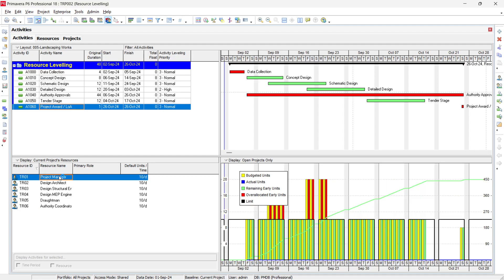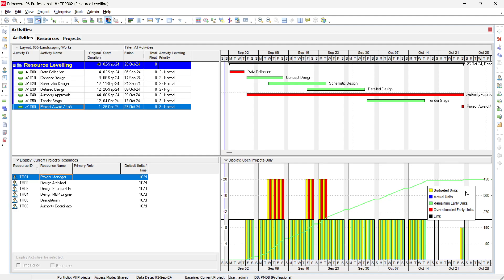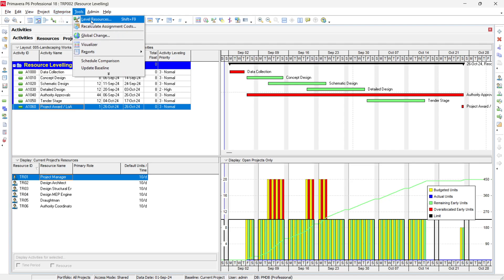In the resource usage profile, for example the Project Manager is over-allocated in the area where Concept Design and Schematic Design overlap each other. The black line shows the limit — 10 hours per day — but the requirement is 20 hours, which is double. So either we add another Project Manager, or if that is not possible, we need to level the resources. Go to the Level Resource button or go to Tools and select Level Resources.